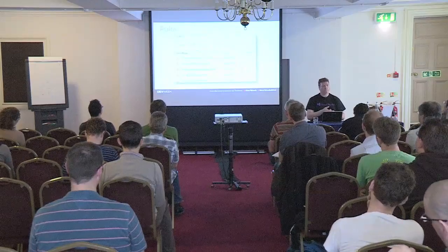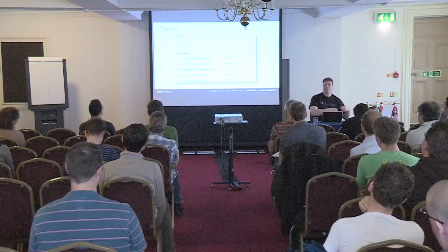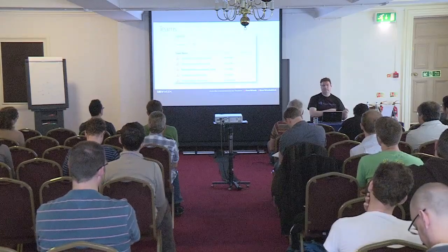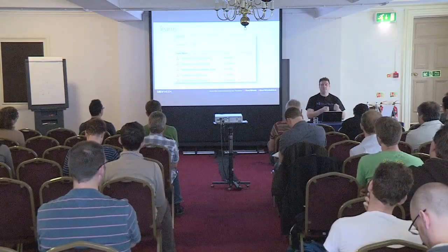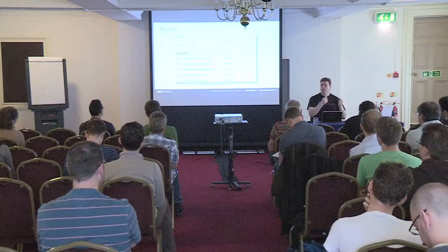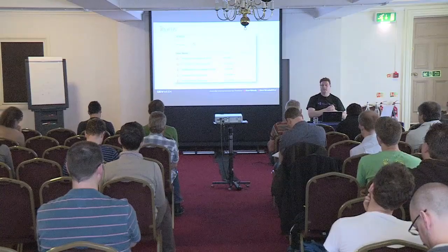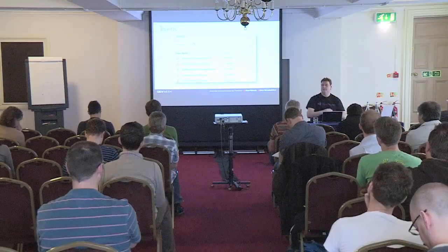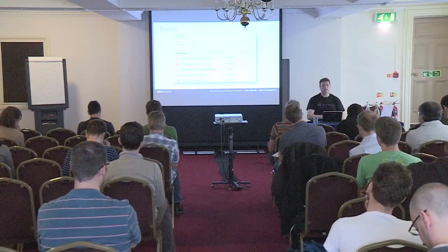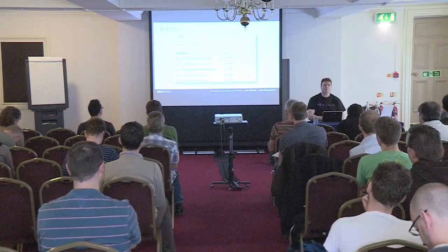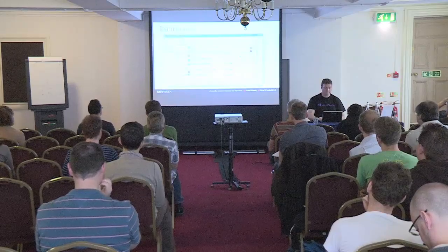We've also got much better support for separate teams within a project in Team Foundation Server. So you can have multiple teams in a project. Each team then has their own task board, burn down, product backlog, all that kind of stuff. And then there's a master team that sits on top of that that can see all of that information. So you can structure your teams in a more natural way that reflects that sort of breakdown.